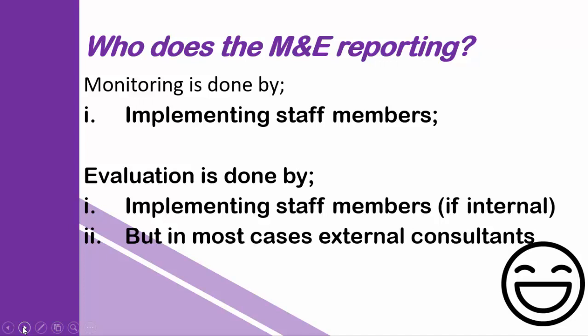But how is evaluation done? Usually, guys, all evaluations are done by external, independent consultants. You have to keep this in mind, and this is what makes M&E what it is. Because if you can imagine the evaluation was done by the implementing staff, would there be any learning?